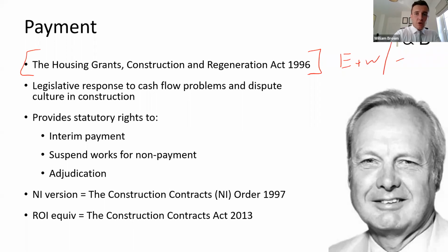or if you're working in Scotland, then that's the law that applies. The Housing Grants, Construction and Regeneration Act of 1996. And that piece of law is effectively a framework. It sets out that your construction contract has to do certain things. It has to give the parties to that contract the right to interim payment, so the right to be paid on an interim basis. It has to give those parties the right to walk off the site if they haven't